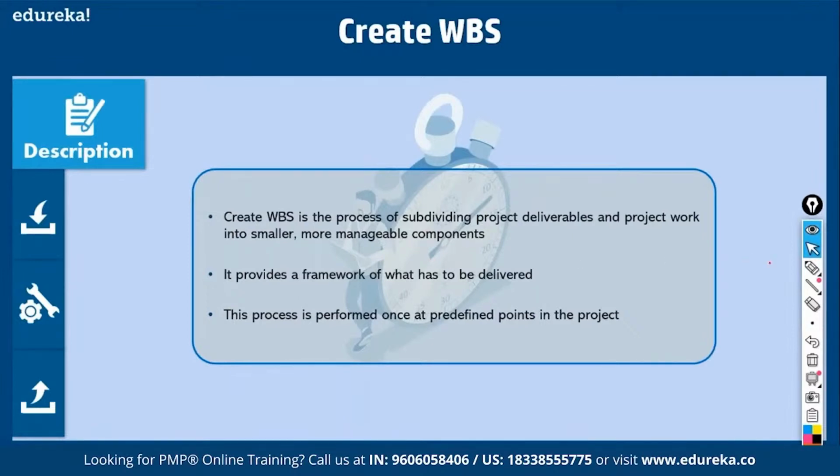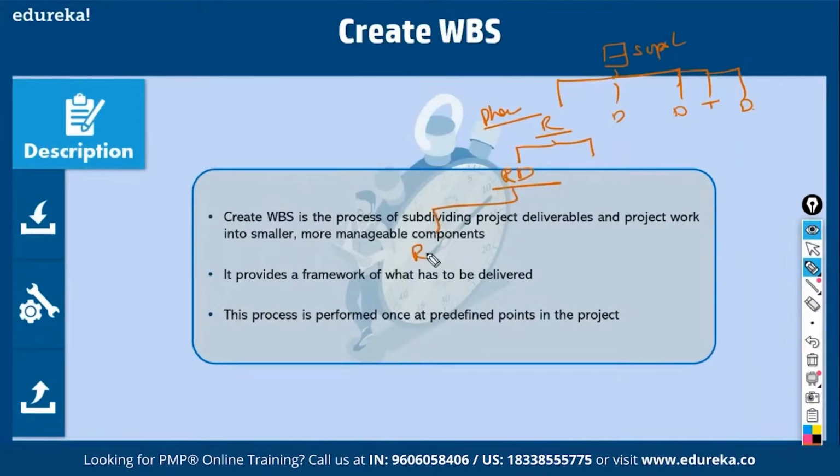It provides you a framework. For example, let us say this is the scope statement. You first break it down into phases. For example, requirements phase, right? Then design phase, then development phase, testing phase, deployment phase. Then from this phase, you define what are the major deliverables, right? For example, requirement documentation is a major deliverable. Requirement documentation for what? Well, Reuters interface, then Bloomberg interface, then interest rate interface, all the requirement documents, right?